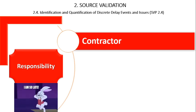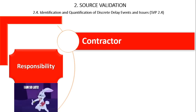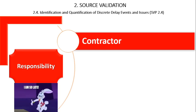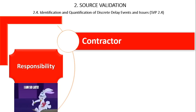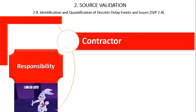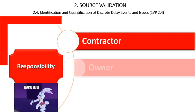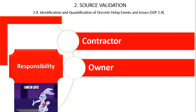Typical examples of contractor delay events include, but are not limited to: delays caused by rework resulting from poor workmanship, subcontractor delays, insufficient labor, management and coordination problems, failure to order necessary materials, and failure to secure contractual approvals.